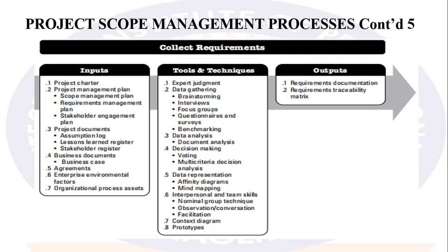Maybe the project is supposed to take you 15 days and they are telling you to do it in one day. You tell them, based on this scope, this requirement and that requirement, we have scheduled a minimum of 15 days to do this project. If we do it in less than 15 days, these are the expected consequences. So for every project, there should be some level of benchmark.